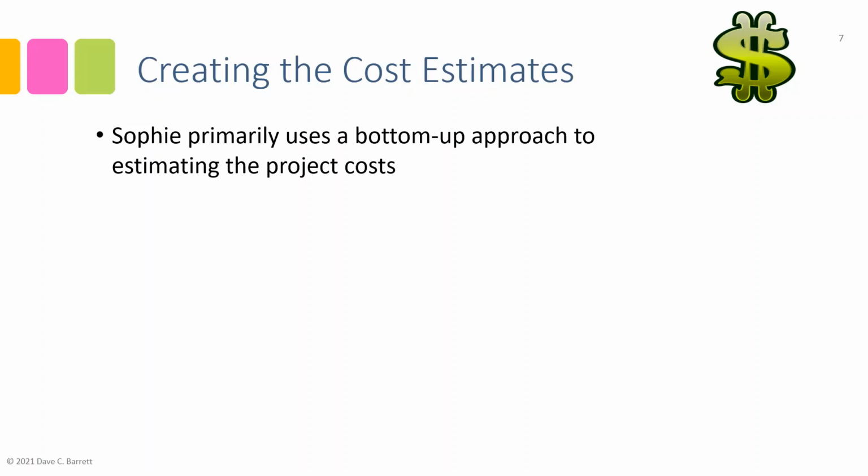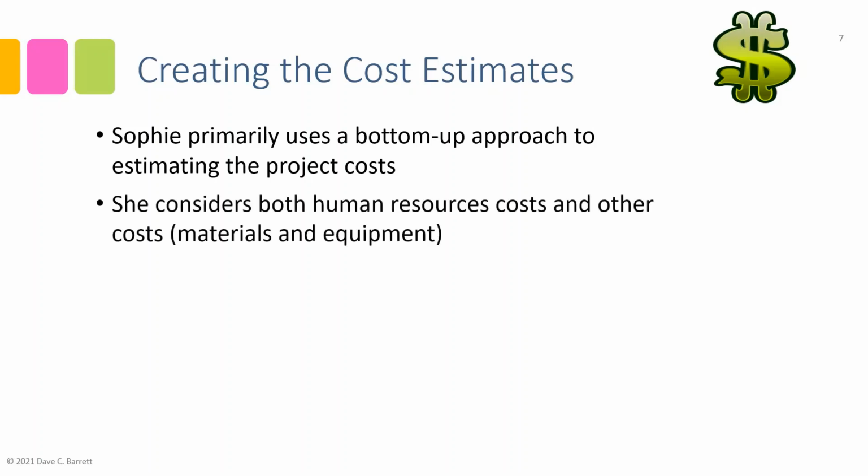for their benefits if they have them, the building costs, the insurance on the building, the equipment costs, all of those things, the cost of the security to keep the building safe and so on. So there's all kinds of costs that are built in. So that's called a loaded rate. And again, it depends on the organization and the project as to whether just the straight salary costs are used for human resources or if a loaded rate is used. And the finance area of the organization will usually advise and make decisions about that.